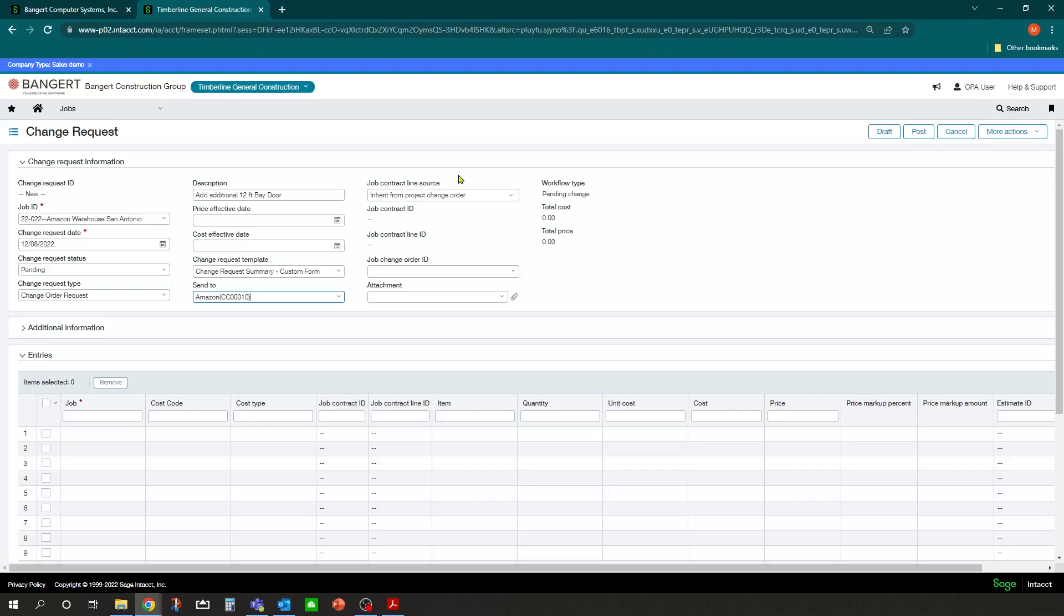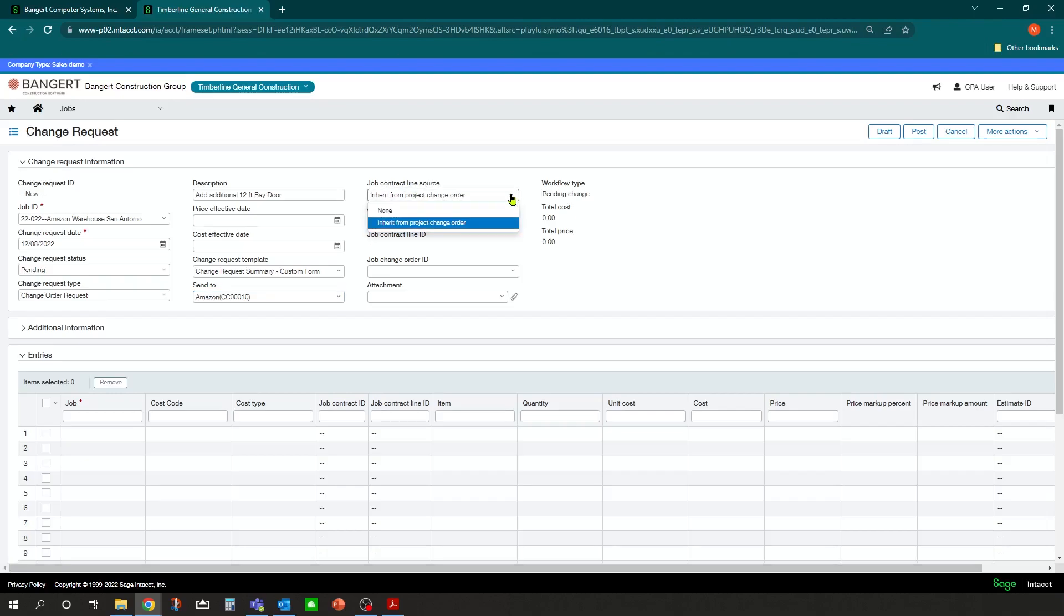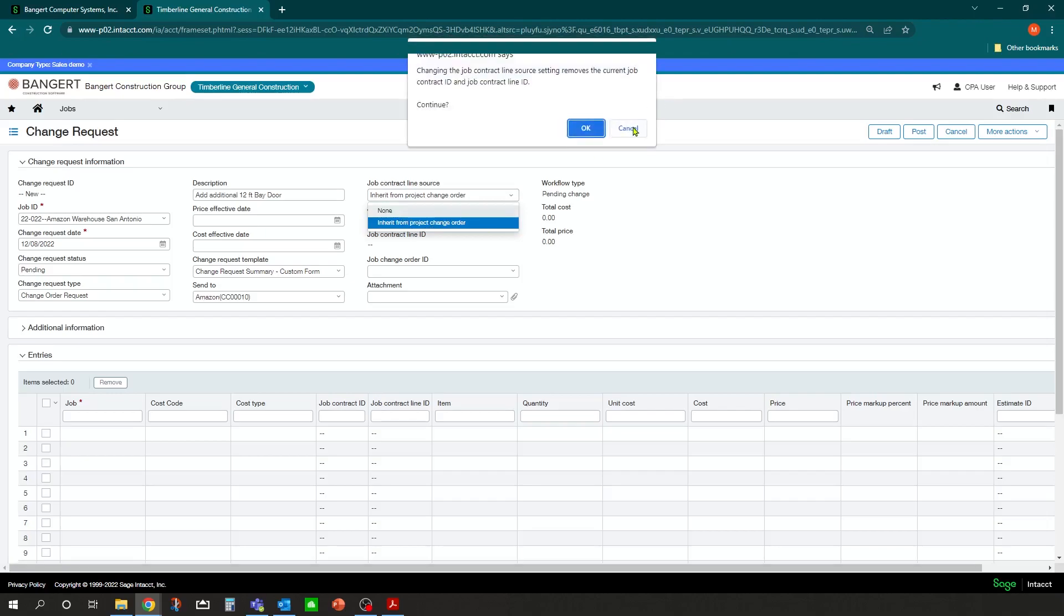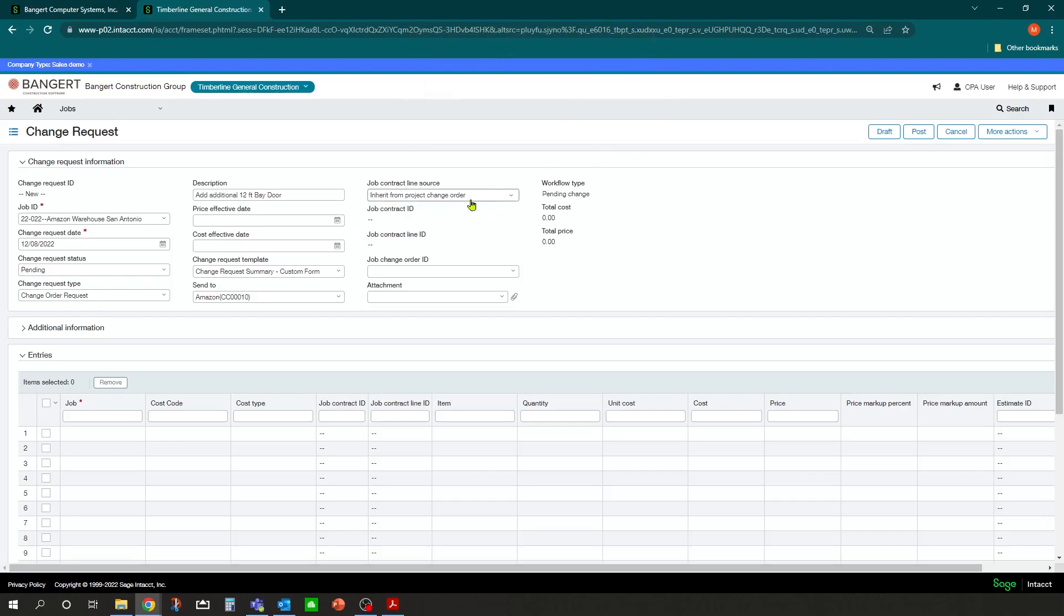And as far as our job contract line source, if this is a change request that is going to be billable out to a project contract, we're going to want to inherit from the project change order the contract line source. If it is an internal change that is not going to be billed out, you would change this status to none. In this scenario, we are going to be billing this out eventually if it gets approved. So we're going to inherit it from the project change order.